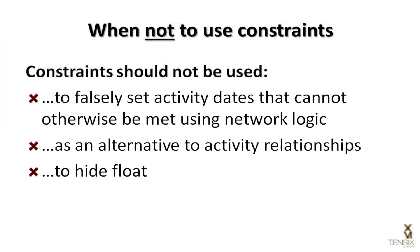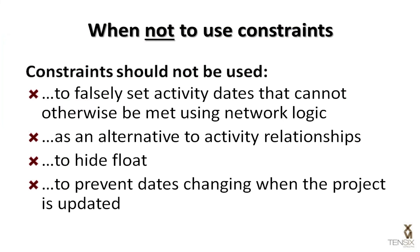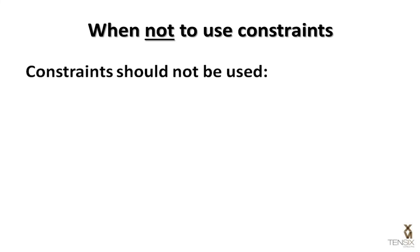Constraints should not be used to prevent date changes when the project is updated. Using hard constraints to lock down activities and prevent them from moving when the project is progressed undermines the schedule's data integrity, not to mention the very purpose for building the schedule in the first place. Effective critical path analysis of schedules built this way is virtually impossible, and the schedule will have little value to the project management team.